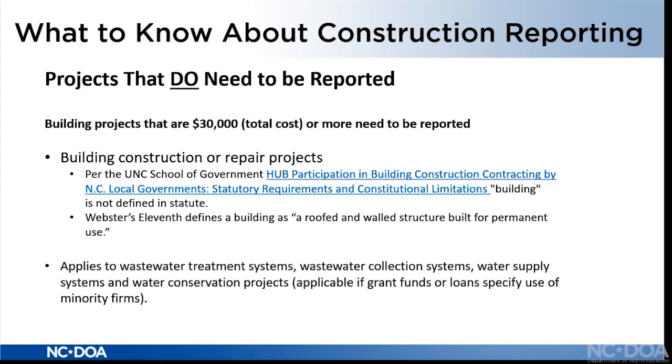This does apply to wastewater treatment systems, wastewater collection systems, water supply systems, or water conservation projects. It's applicable if the grant funds or loans specify the use of minority firms. So you would need to pay attention to your grant funds or loans to see if they specify that. We have set up some features in HUBSCO Plus that allow for tracking linear feet of piping. So that is something that's in there.